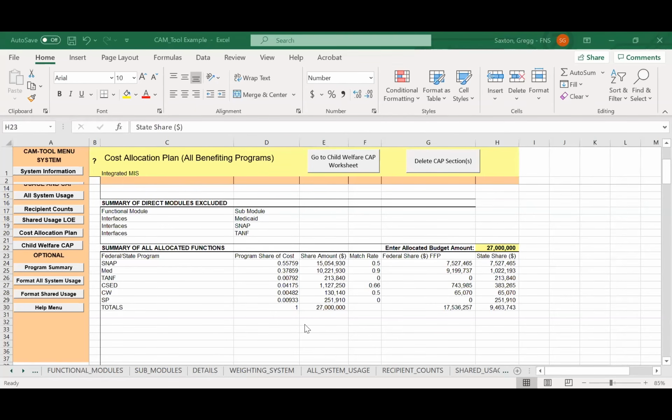But it would have to have a dramatic impact, and it would have to be ongoing. So for instance, would you need to adjust your cost allocation because of the temporary changes in policy during COVID? No, you would not need to, because those are time limited and things will go back to, quote, normal after that period. So the project can move through that period without making an adjustment to cost allocation.